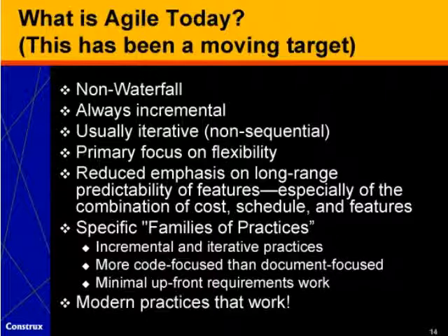I say it is always incremental, but it is usually iterative, meaning usually we don't define 100% of our requirements up front, but we define them at least to some degree, piecemeal over the course of a project. There's a primary focus on flexibility. That is more of a focus on being able to change course in response to changing needs or better understanding of needs than long-range predictability. And especially there's a reduced emphasis on the long-range predictability of the combination of cost, schedule, and features.